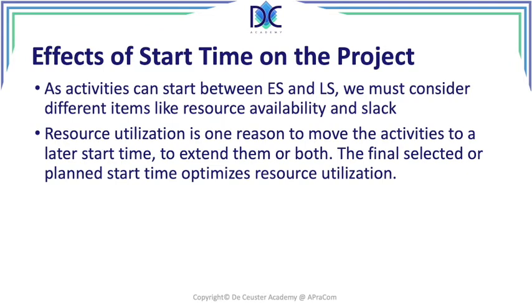Now, resource utilization is one reason to move the activities to a later start time or to extend them or both. So we can move the activity to a later start time, keeping the duration. We can extend the duration without changing the start time, or we can have the combination of both. We move the activity and we extend the activity. The final selection is in fact when we find the planned start time, when we optimize resource utilization and slack